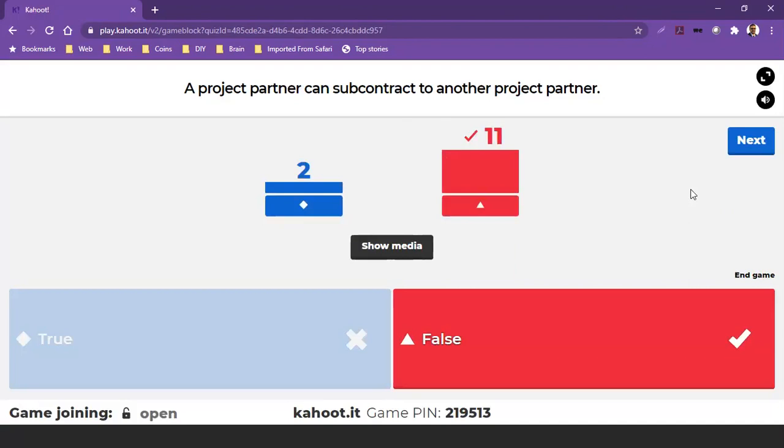If you identify a subcontractor to delegate the activity, it must not be your project partner. It's very important that you do not do this because the costs will not be eligible.